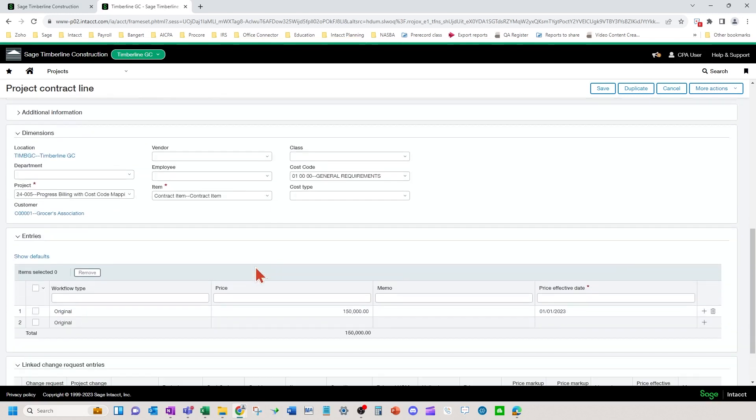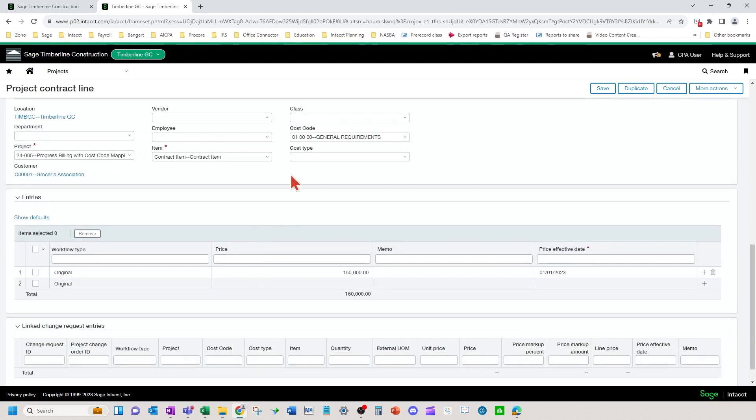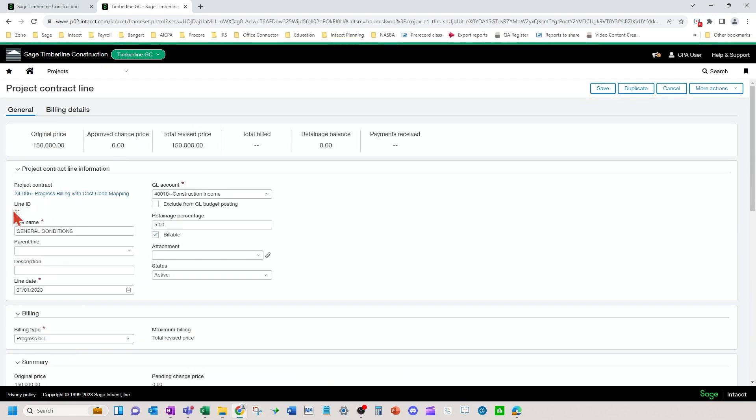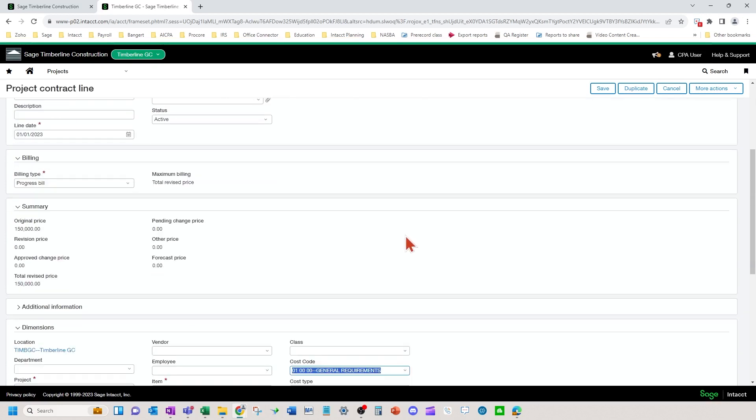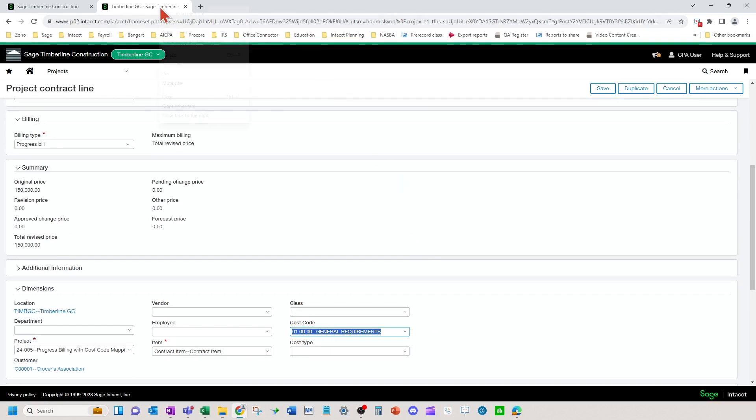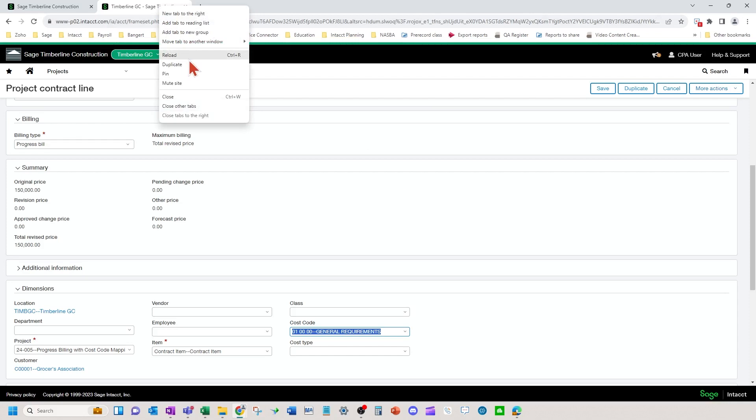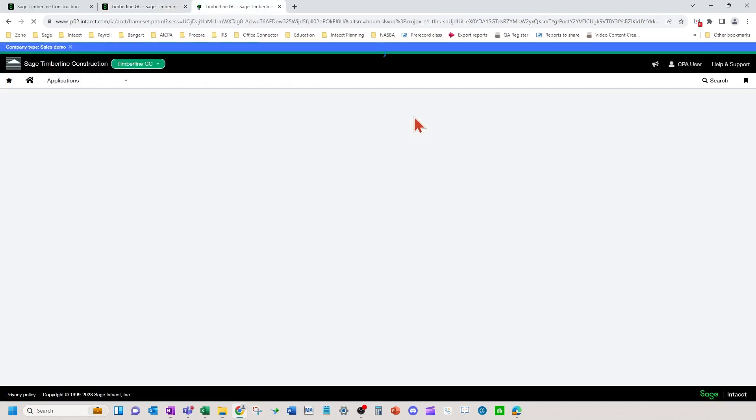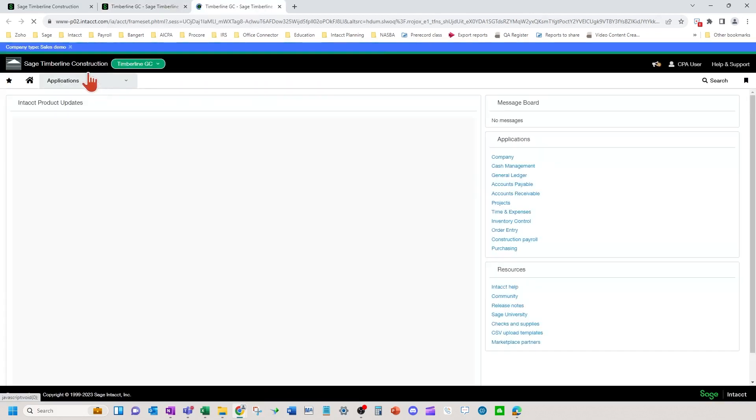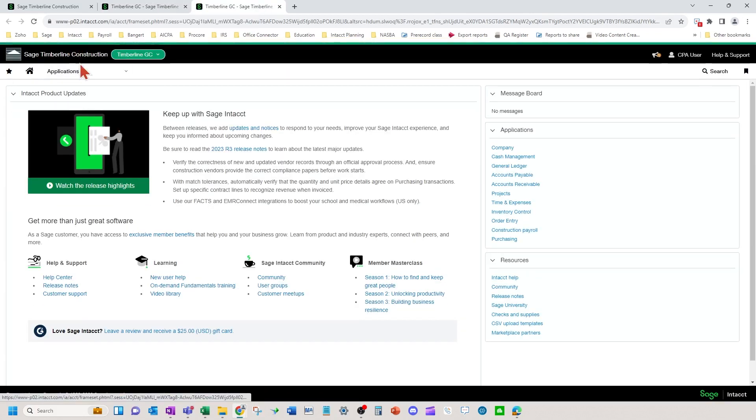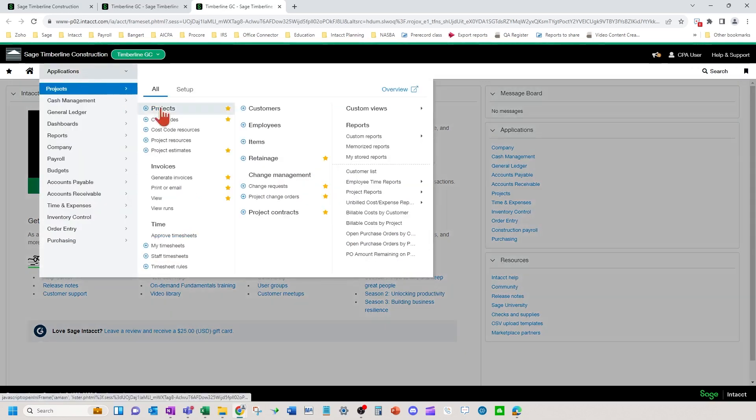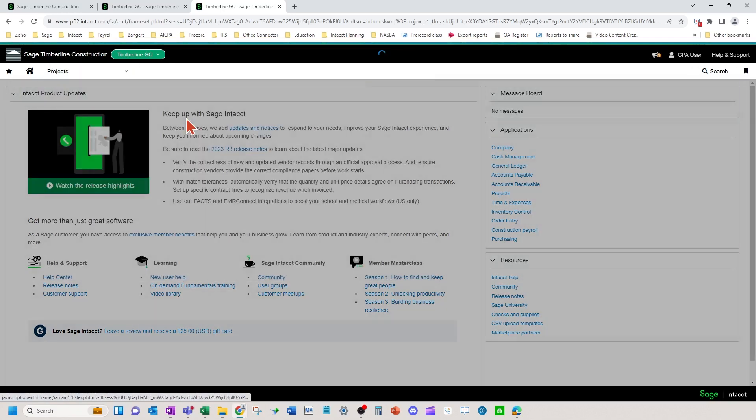You're going to come down here and you're going to put in a parent cost code that relates to this line. So O1 general conditions, generally speaking, goes with the O1 cost codes. Now, when you do that on the cost code side, you're going to need to set up, do some things to your project cost codes. The project we're working with is 24005.